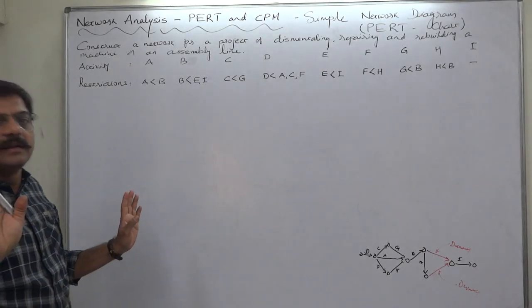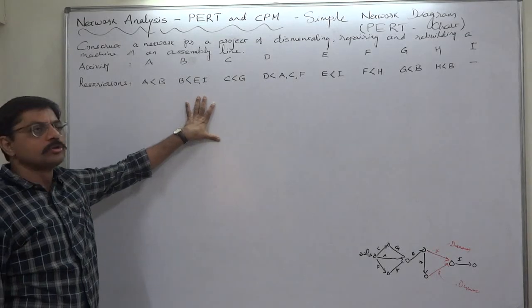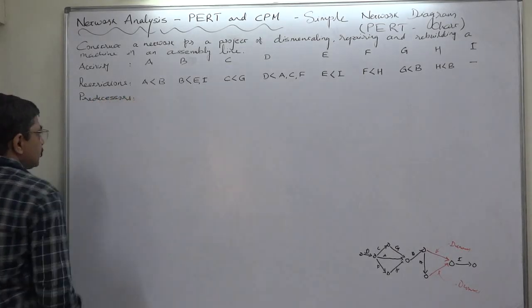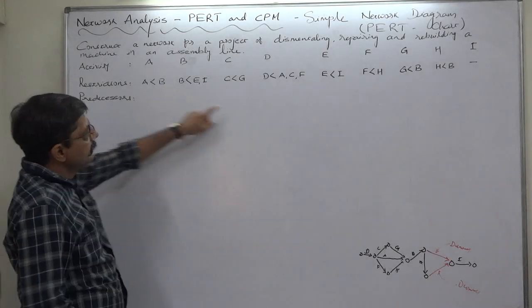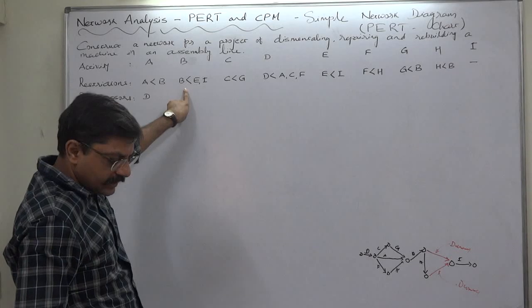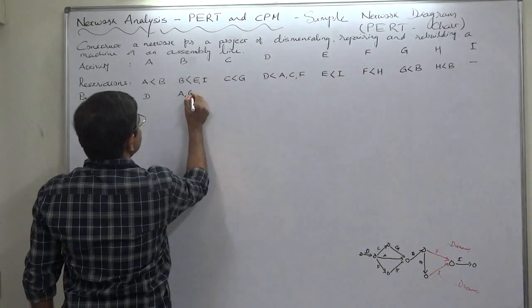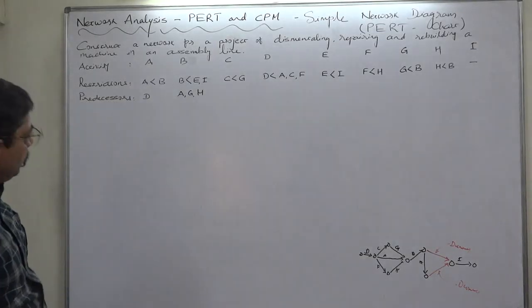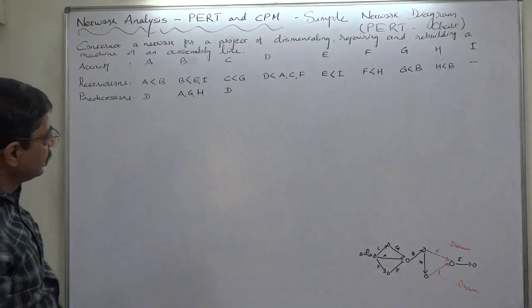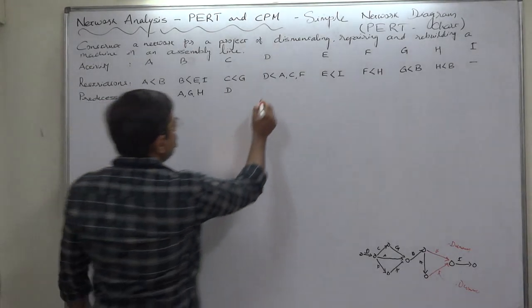We are not habituated to draw a network diagram from this kind of information, so to make it easy, let's first of all write the predecessors. A's predecessor is D. Which one is predecessor of B? There are three predecessors of B: A, G, and H. C: D is predecessor of C, only D. D: No activity is predecessor of D, that means D is the initial activity.